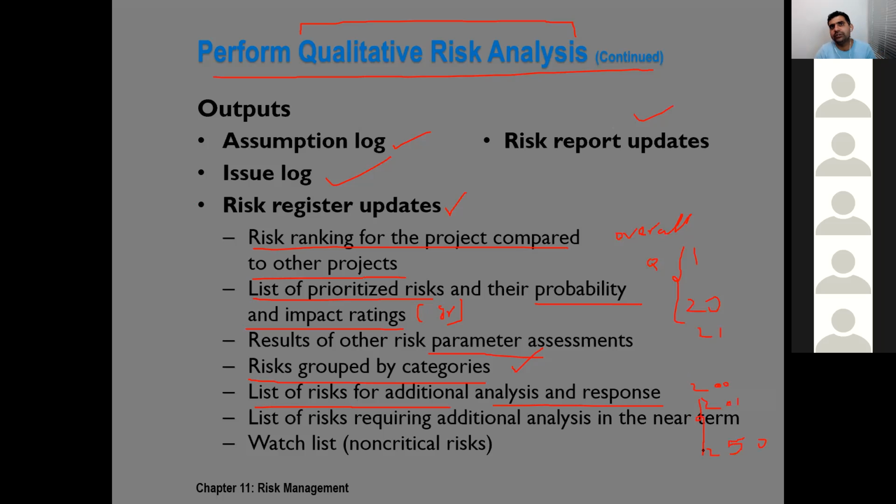Why do we need to spend more time on them? These types of risks are called non-critical risks, and we just put them in the watch list. We don't create a response for them.